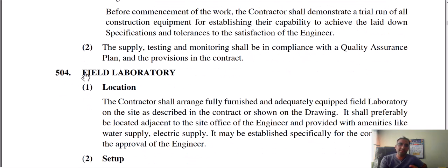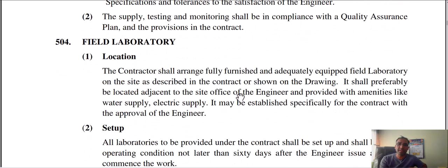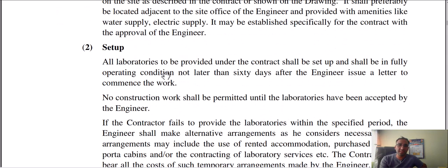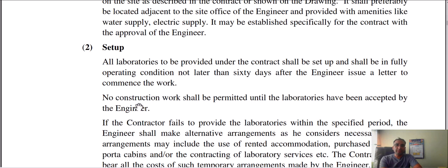What is the standard specification for the field laboratory? All laboratories to be provided under the contract shall be set up and shall be in fully operational condition no later than two months after the letter of commencement. This is the first setup requirement, and there is a certain construction standard for the laboratory setup.